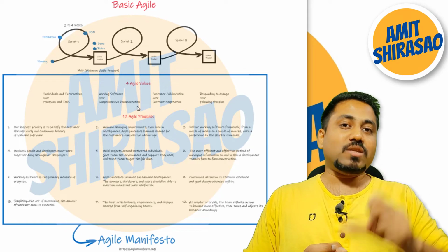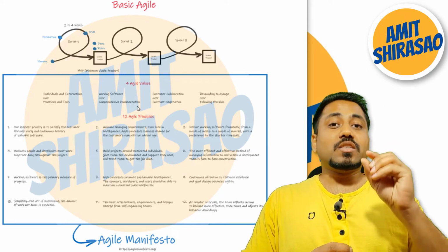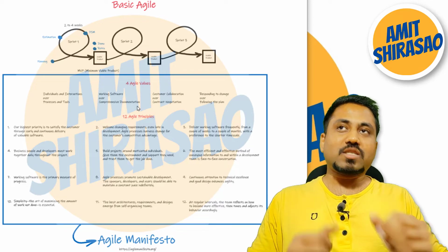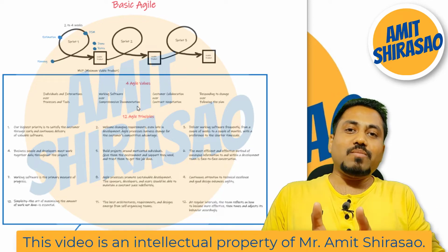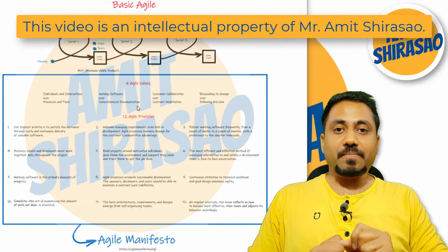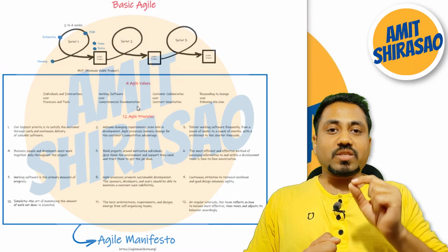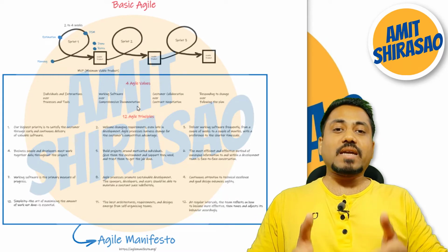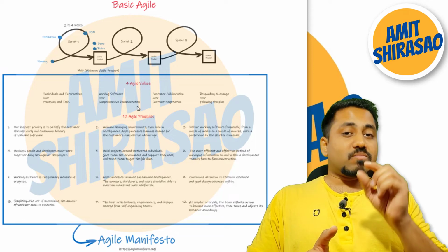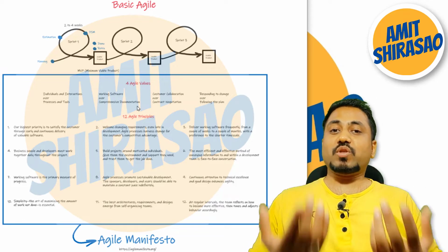So that fortnight, those 15 days, is called a sprint. In that sprint, before you start the sprint, there's a sprint planning meeting. So you plan what you're going to do in that particular sprint. Then every single day of the sprint, you're going to have a daily stand-up meeting, that is DSM, wherein the team will see what is the plan for today.